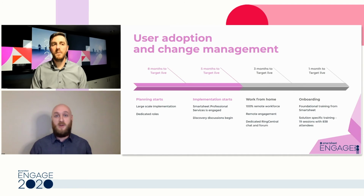So there were two things that we did that I think we were extremely successful on. The first one was setting up a support channel, a chat channel. We used the RingCentral application and created a team inside of it with all of our user base. We started this a few weeks before Go Live to make sure any questions from training, questions on what was coming for the transitional period, we get them early, so it wasn't just a fire hose all at once on the day of Go Live. It's actually still running today, and we have no plans on discontinuing it. It's a great way for everyone to just get their questions into us. Maybe I'm not free at that second, but my team is, or whoever is available and sees that there's a question in there, they'll jump in and triage it right away.